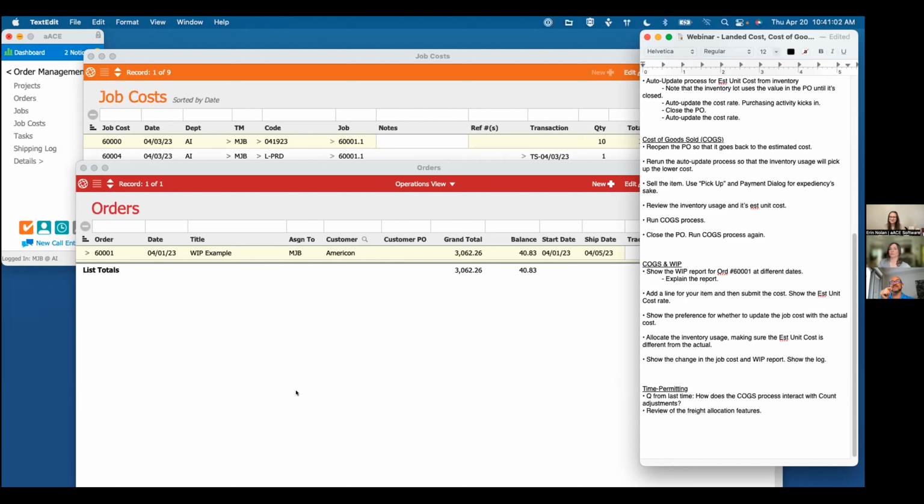You might buy that diamond tip and that order might be 90% complete from a cost perspective, but you haven't spent 5 minutes. So there are plenty of scenarios where those numbers just don't jive, and some human intervention is required. So we think we're treading that line quite well right now.